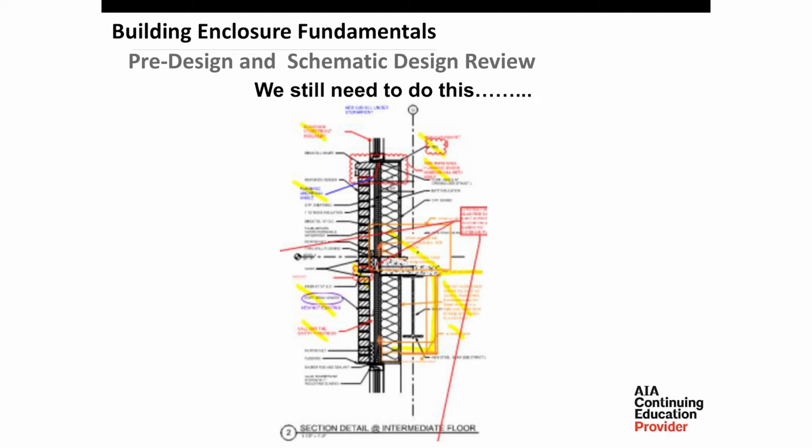So for owner project requirements, we define what the owner wants. It should be created during pre-design. I think usually it is. I think that's usually there in place. Maybe it doesn't get integrated quite as well as it should till later on in the project, but it usually is in place early on. And it often outlines high-level goals and objectives. So that's what it should do.